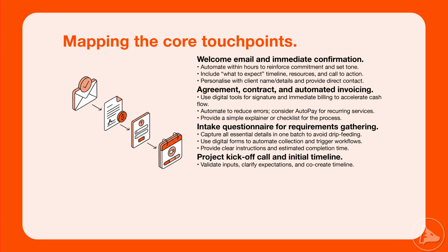This is where you validate their intake responses, clarify expectations, confirm roles and responsibilities, set a first timeline and milestones, explain how communication will work, use a self-service scheduling link to avoid "when are you free" ping pong, and after the call, send a recap within hours. That recap becomes the alignment document everyone relies on.